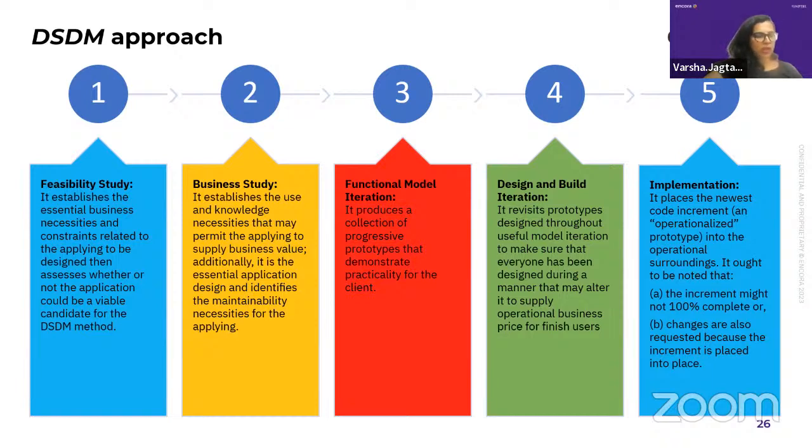In pre-planning, a business sponsor, kind of a CEO, comes with the requirement or scope, what project he wants to do and his motives. Risks and benefits, resources and facilities, time scale and budget are discussed. That is your pre-planning phase.